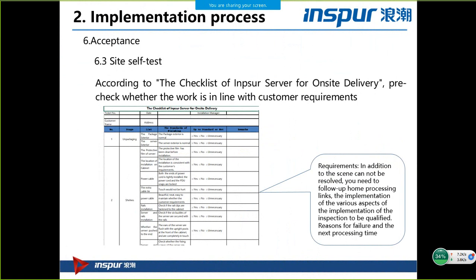And self-test. In our portal, there is a checklist you can download, and you can check the servers for each checkpoint. But you also need to confirm with the on-site tech. Maybe they have other additional requirements, so you also need to help them to do it.